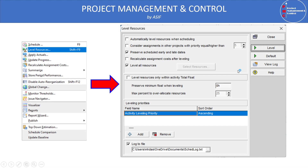When you click Level, all resources are leveled regardless of whether they have float or not, so there is a high chance the project duration will increase. If you do not want to increase the project duration, check the option 'Level resources only within activity total float' — only those activities with float will be adjusted, so there is no impact on the critical path or project completion.